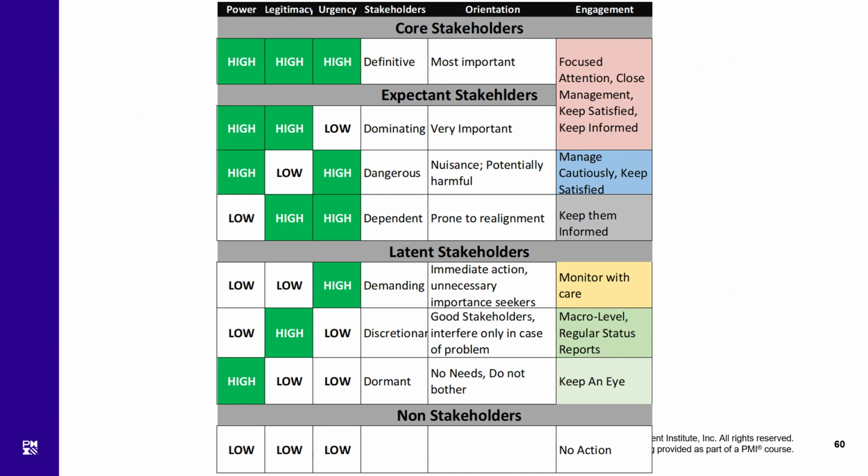So how do you as a project manager deal with them? They may be your team members. Keep them informed. Always keep them informed that this change request is with the change control board and we are waiting for the response. Although it is in a lot of hurry, you see the change control board meets only once a week or once a month. So we have to wait for the next meeting, things like that. So you have to keep them informed and cool.